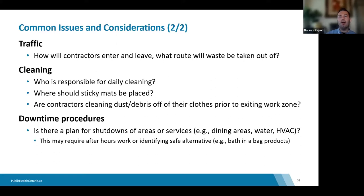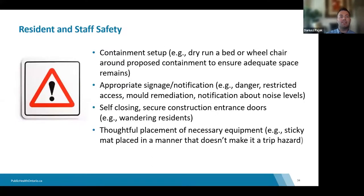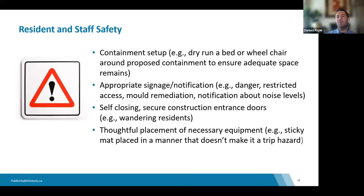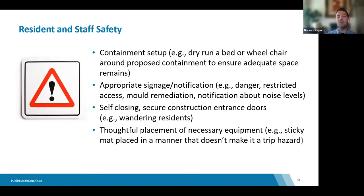An important safety consideration: construction sites often have sticky mats placed outside of doors so construction workers can get dust off their boots. However, those mats actually create a hazard for residents — they are tripping hazards and residents could stick to them. Make sure sticky mats are not outside the construction zone but immediately inside it.